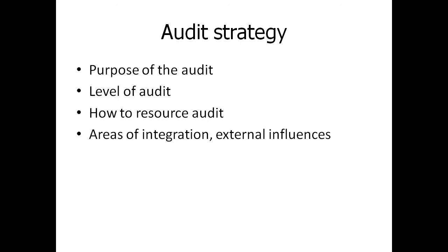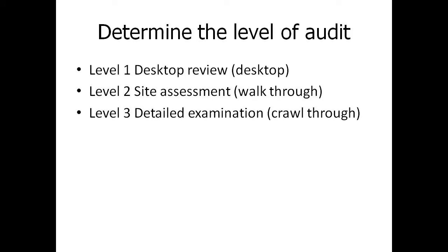We might also consider in the strategy areas of integration. What I'm saying here is it might be possible, and it is in most cases, to make performance management of subcontractors and preventative maintenance contractors, and that's including grounds maintenance, cleaning, energy and waste and so forth, a requirement for them to provide audit data as a part of their performance-based contract. So some of that can actually feed straight into this audit program. So as I mentioned earlier, determining the level of the audit is going to be quite important.